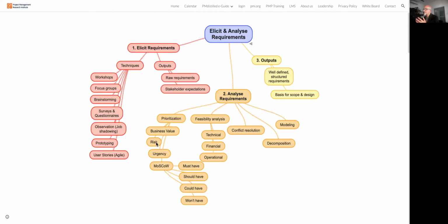For example, if you take an agile project, there are 10 iterations, and if I put all the high risk items in the first 2 3 iterations, even if it fails, the rework component is less. But if this high risk item is coming in the eighth iteration, and if it is really impacting the architecture itself, then the project can fail.